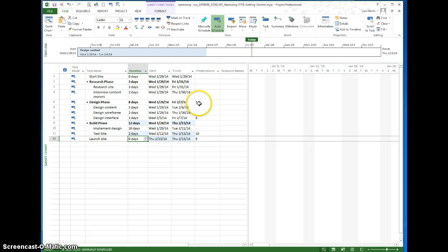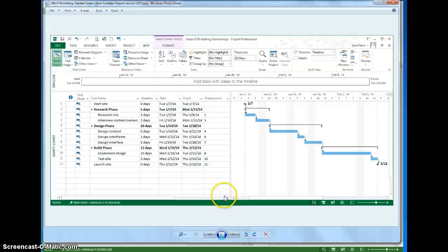Now, you can see in your predecessors, you just got a couple here, and I don't know if you maybe used a shortcut that didn't work out, like the linking button, but really the best way, and the way I recommend in the beginning when you're new to this, is just match the screenshot. Pretend this is Excel, and you have to type those numbers exactly in the cells that are shown here. Okay? So in other words, there's nothing in the first row. There's nothing in any of these summary tasks. Notice none of the summary tasks have a predecessor. We're just linking the actual tasks.